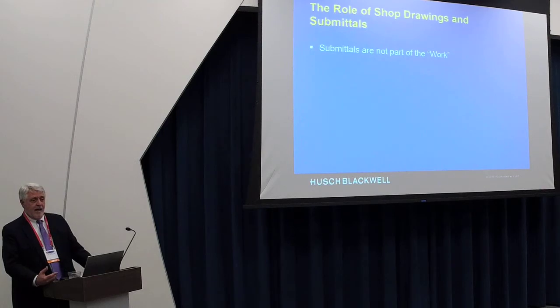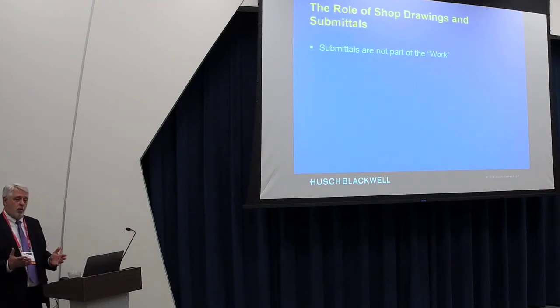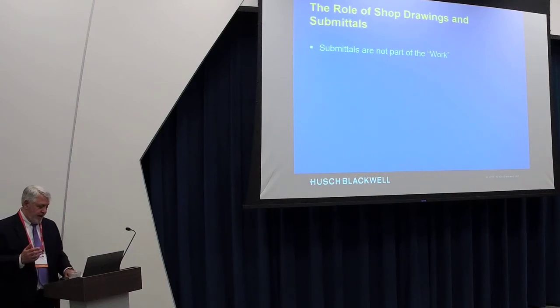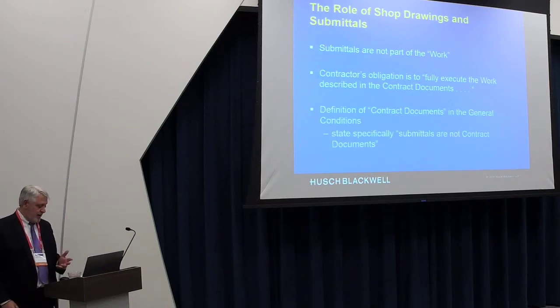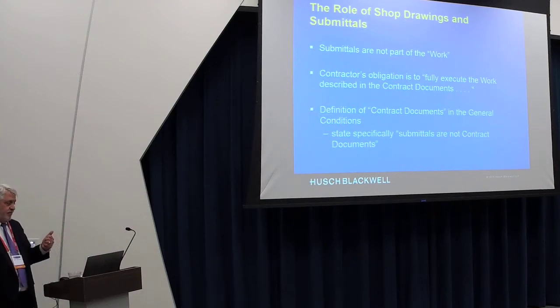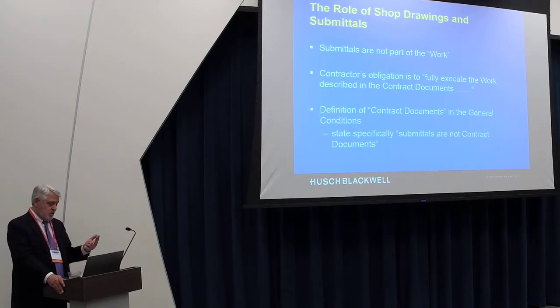Equally important, though, is remembering what submittals are not. Submittals are not part of the work. The work is very defined in the AIA contract documents. The contractor's obligation is to execute the work described in the contract documents. And they define what those contract documents are: the drawings, the specifications, the contractual agreement, the general conditions, etc. The noticeable absence from the list you'll see in the AIA documents are submittals and shop drawings, because they are specifically excluded under the contract documents.